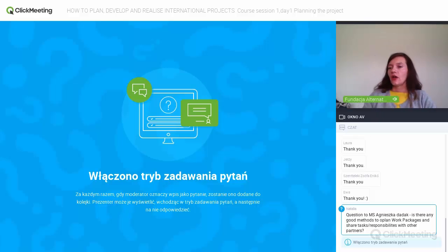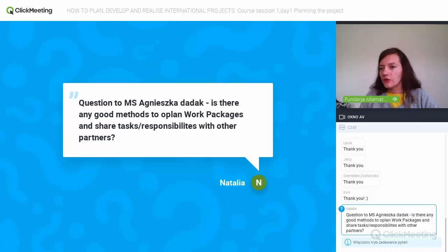Well, there are various ways of working. I believe it will also be addressed in the future parts of the presentation. Oh, sorry. Yeah, here it is. I'm very sorry, I'm learning the system. Work packages are the small bits of work to be done. Especially if a project is a longer one, lasting more than a year, it's worth dividing it into phases and into work packages, so tasks to be realized.